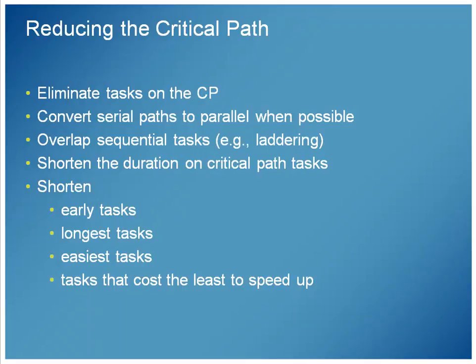And when you're looking to shorten, some strategies, heuristics, rules of thumb, are to look at the early tasks. They tend to be a little more specific in our knowledge, and sometimes easier to shorten up. As you get toward the end of the project, it's really hard to know what you're going to be dealing with, and if you have to leave a little bit of leeway in there, you're probably going to need it at the end more than at the beginning.